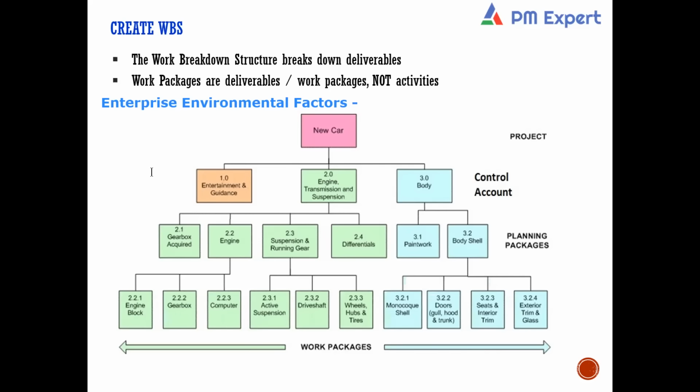For example, if I'm building a school, or a college or a hospital, is there a separate component for approvals and fulfillment of government compliance, or fulfillment of regulations? Should they be taken as a part of the work breakdown structure or not? Yes, they should be taken as a part of the work breakdown structure. Correct.